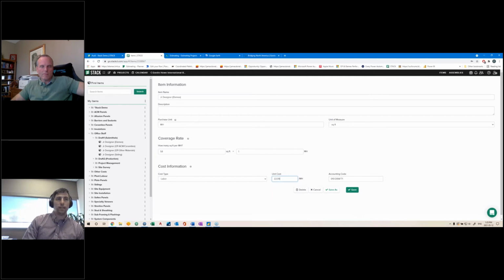So I'd love to see the costing fixed to each estimate. And I know that's probably a big ask, but that would be a great option. I think having a column here to see, hey, when was that item last updated would be good as well. I know for me, in our old system, twice a year I go through the list and we take a look and say, okay, have we got a recent updated price on this?